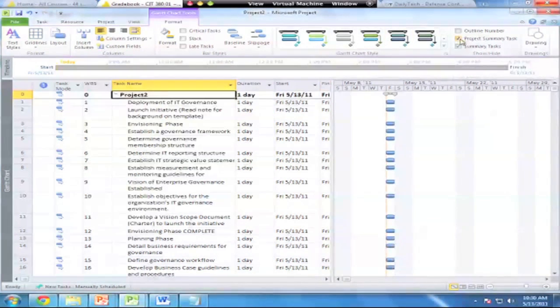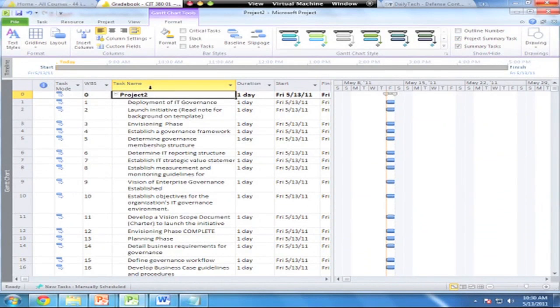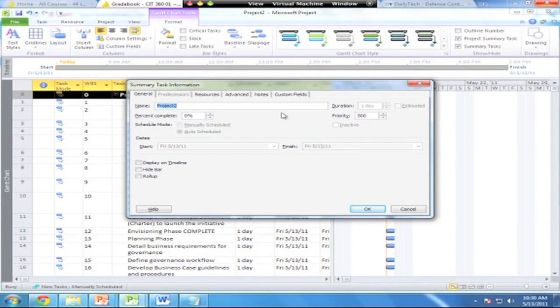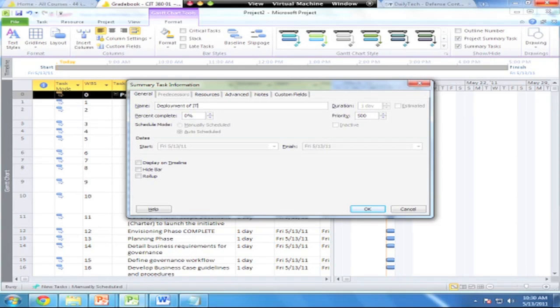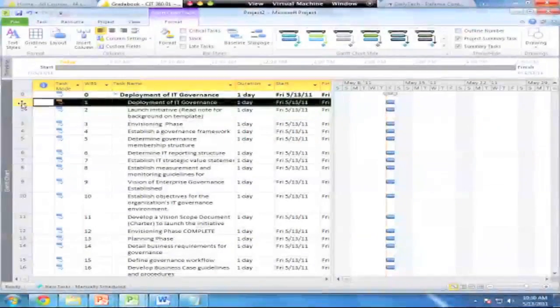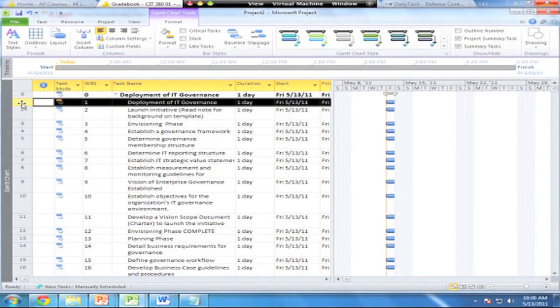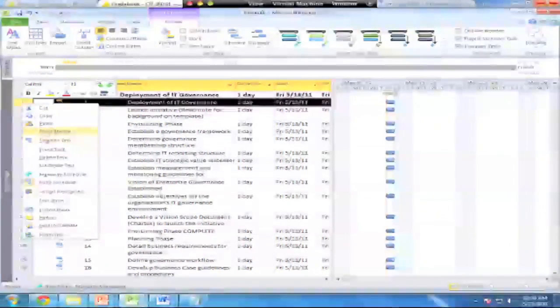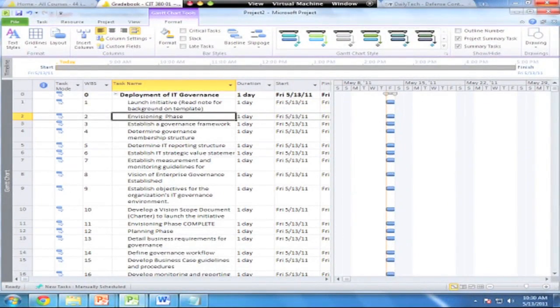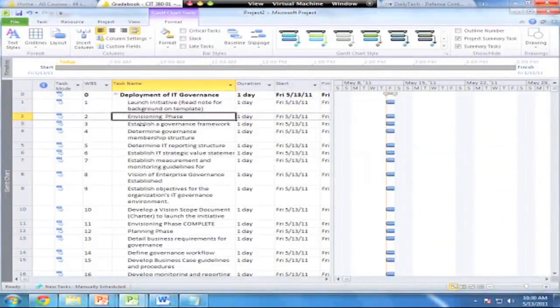Let's come back over here and recreate that. First thing I'm going to do here is under the Gantt chart tools, under the format tab, I'm going to go to the project summary task. Now it gives the overall project a name. I'm going to double-click on that, and I'm going to name my project 'the deployment of IT governance.' There's my project name. I'm going to delete this task now because I don't want the duplication between the two.